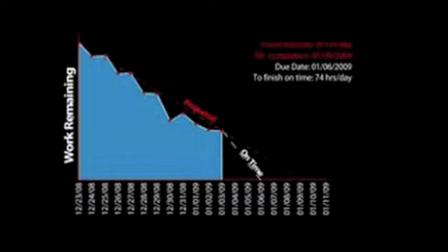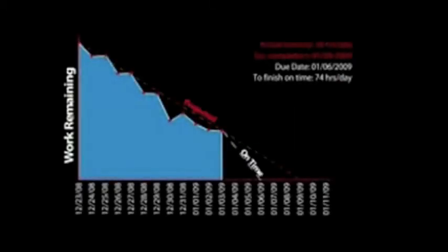So let's talk a little about where the data for this incredibly useful burn-down chart comes from. As you recall, part of the release planning process was to create an estimate for each feature in the product backlog. The collection of these estimates for a given sprint represents the total amount of work that must be done to complete that sprint. As each team member goes through and makes progress on one or more of the features, they simply update the amount of time remaining for each of their own items. So the total amount of time remaining on the group of features that make up a sprint changes on a day-by-day basis, hopefully going downward until it hits 0 when the sprint is complete. The burn-down chart aggregates the remaining work data and shows it visually.